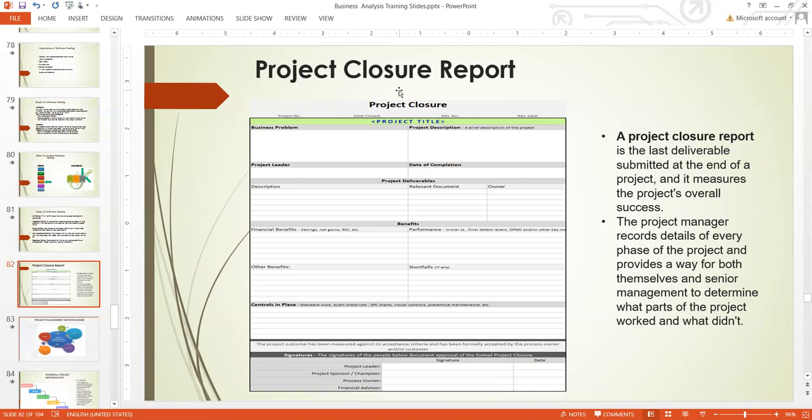Although, as a business analyst, there is one thing you need to do before it, but it's part of the closure, because it's the duty of the project manager to write the report. But the business analyst writes the acceptance report. You just fill an acceptance form, which you give to the client or the project sponsor to fill to show that he's happy with your project, and the project can then be closed. Because the project has gone through all the tests and everything is fine, it's a very simple process.